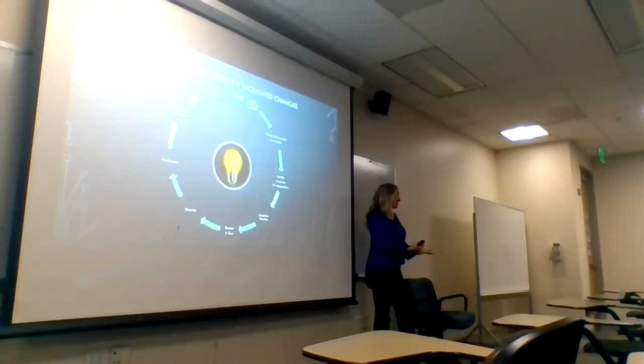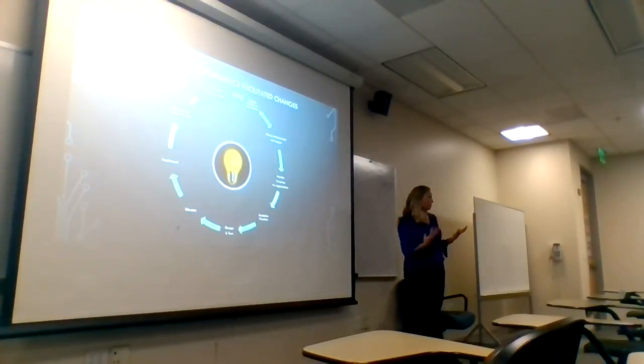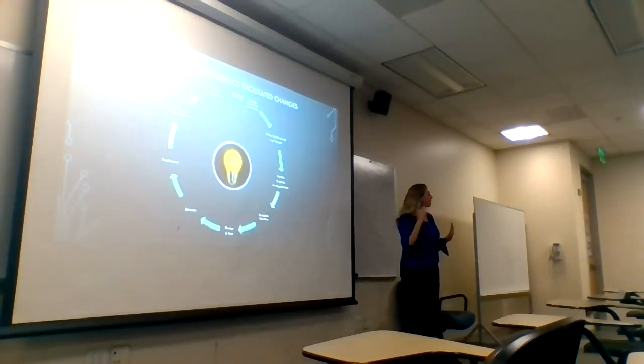And it doesn't mean they're all good ideas. Doesn't mean they're all bad either. But it's really looking at how important this is to more than just that person, and how it is in alignment with organizational priorities, patient priorities, things that really matter and warrant using time to deal with. So in our informatics process, I'll run through this. We have a committee that reviews the needs and the requests and says, yeah, that seems like it matters and is in alignment with our priorities. And then we prioritize. Within the organization, how important is this?